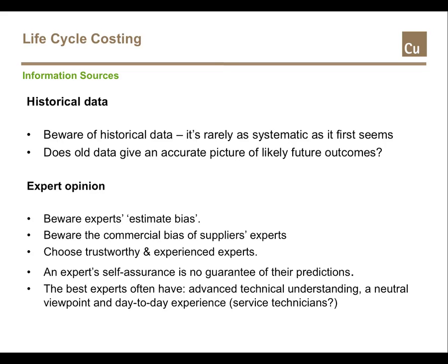If the products you are considering to buy include new technologies or improved designs, you should think about a way to correct historical data for your assessment. The correction you decide on will be one of the assumptions on which your LCC model rests. In many cases, you will find yourself dependent on expert opinions. Here you face a particular problem that academics call estimator bias, which means that some of the experts you consult will be overly pessimistic while others will be overly optimistic. Feel free to interpret or weigh the expert opinions you're collecting.